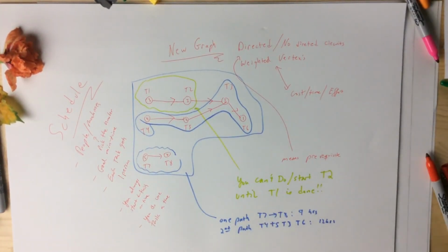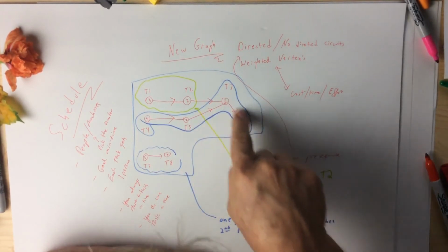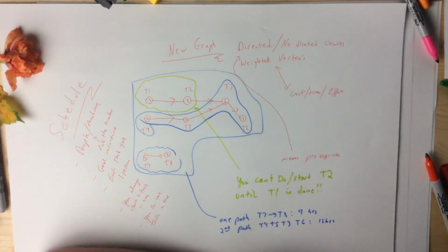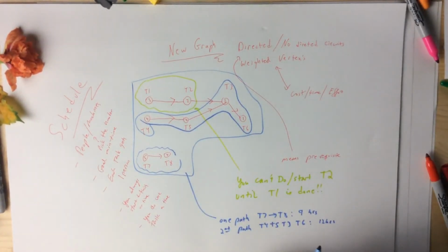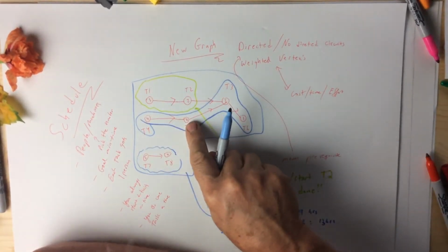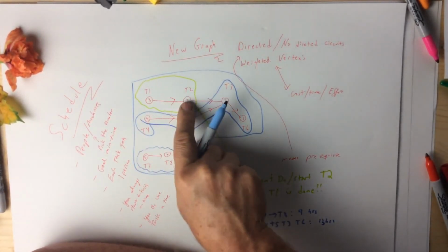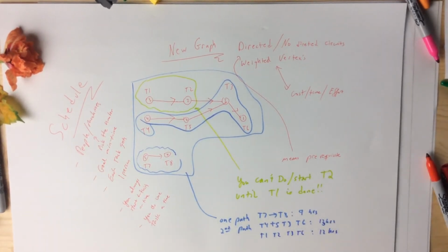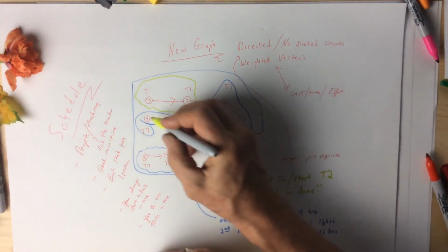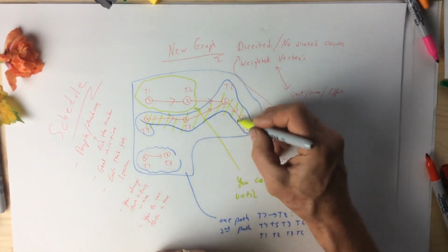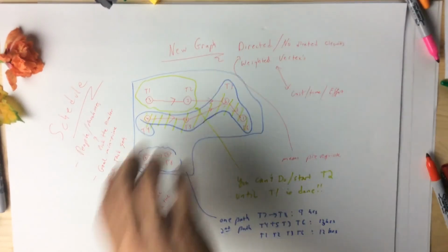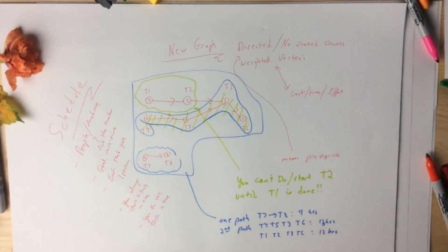So now I ask you to find how many paths can you find here from a beginning to end? 1, 2, 3. Not too many. 5, 11, 13. Oh, 6, 12, 13. That was 13 hours. Sorry, I misadded. 4 and 2 is 6, 12, 13 hours. This path, 3, 2, 6, 1, is 12 hours. This T1, T2, T3, T6 is 12 hours. So this one right here, this very specific subpath within the picture says no matter how many people you throw at this big job, the earliest time you can finish this is in 13 hours.